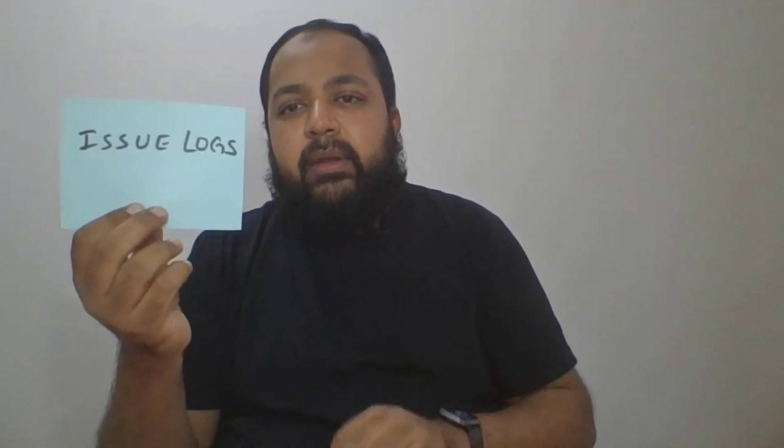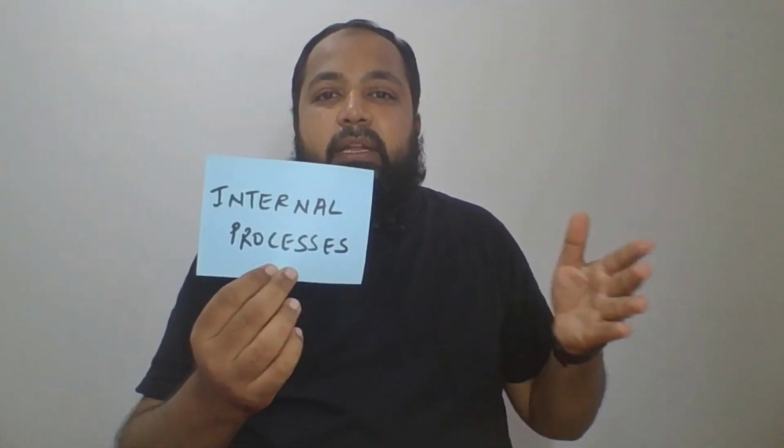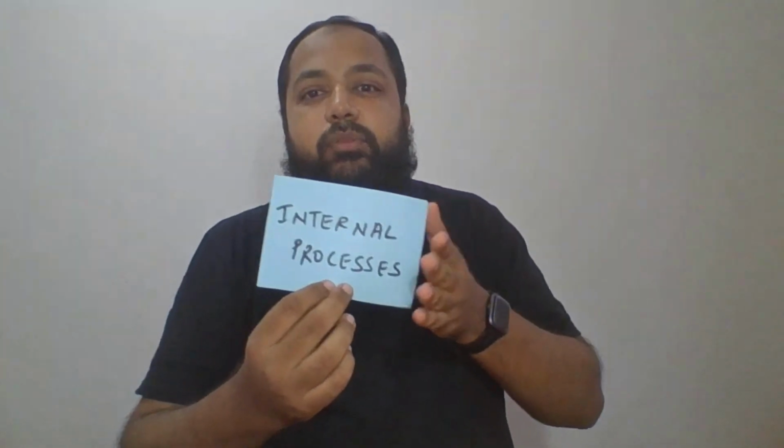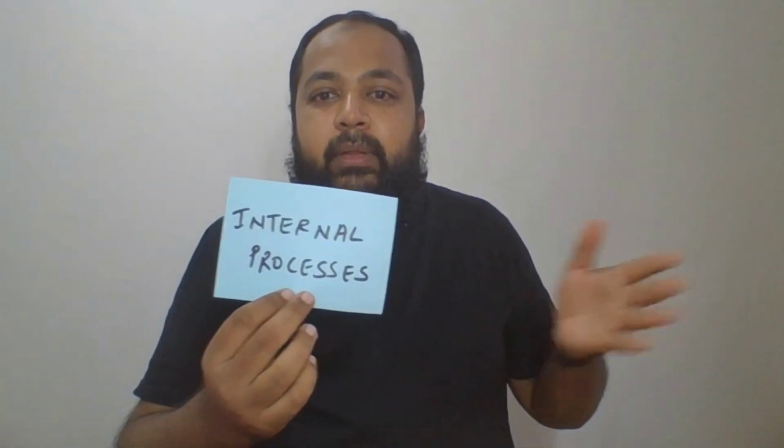Next thing is some more ways of getting the requirements: document analysis. What is that? You'll analyze the agreements, analyze the business cases, analyze the issue logs. What are the different issues? Did we miss this requirement? This issue is there. Do that also. Then see the RFP, what was given in the RFP, what can be the correct requirements. Then internal processes, for example, the CAB process. They need at least the CAB, let's say change to something like 4 days before the deployment to be done. Then you have to take care of this requirement also. That's about the document analysis.